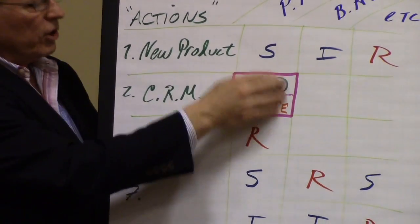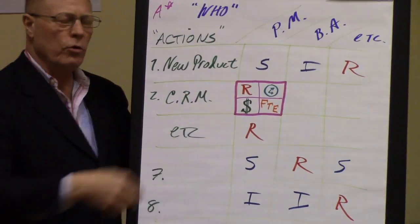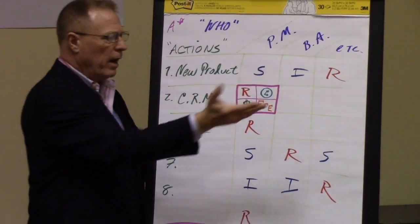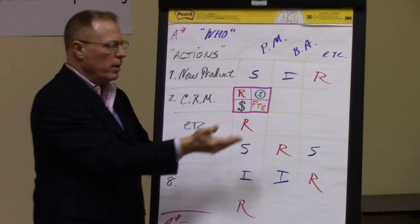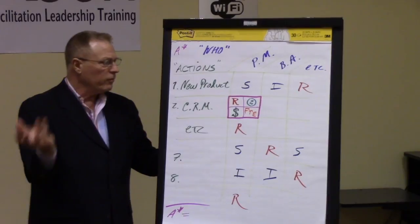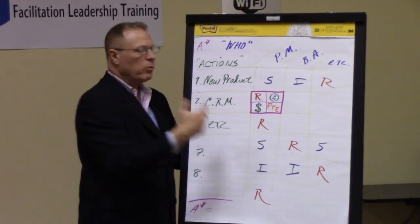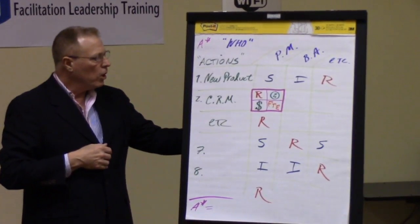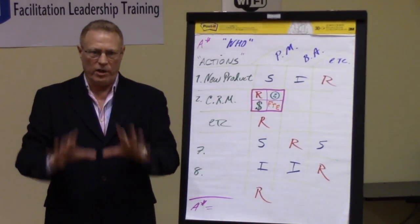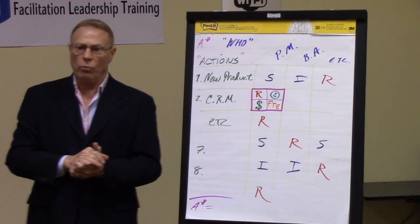You can imagine leaving a room with all of your actions assigned in terms of who's responsible, who's supporting it, who needs to be informed about it, approximately when it will be done, approximately how much money is required, and approximately how much labor is involved. You have, in essence, what is called a Gantt chart. It's a project plan, and from this moment forward we can actually get to work.